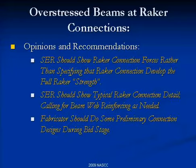The SER should have shown a typical raker connection detail, and if he didn't want to get into connection design, could have noted 'web reinforcing as needed' — which would have been a big red flag. Going back to that drawing with 800 kips on the raker, perhaps the fabricator when preparing his bid would have called an engineer for a preliminary view of what that connection should look like. The recommendation is that fabricators do that — stay out of trouble at the bid stage, unless you want to go to the litigation stage later to recover the money.